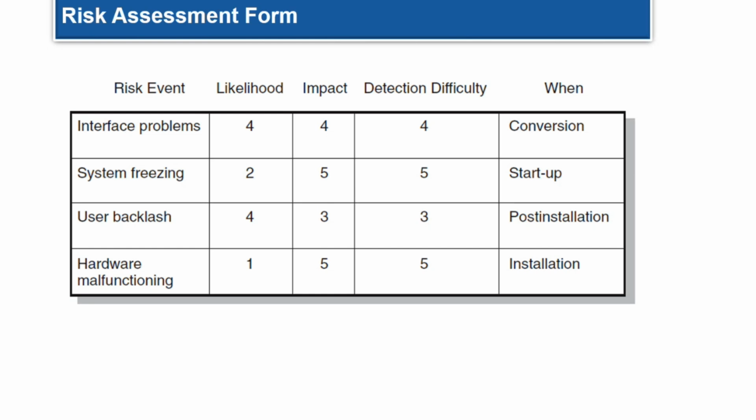I use the example of the project runaway again. In this case, you can identify, for example, food delivery issues, maybe an alcohol problem, or even some people getting drunk. Okay, that's just an example. Then you can assess the possibility of this happening and what kind of impact it would have, how easy it is to detect this situation, the alcohol problem, that's what I mean, as well as when and how you can address this problem. So this is a risk assessment form that you can incorporate into your assessment.